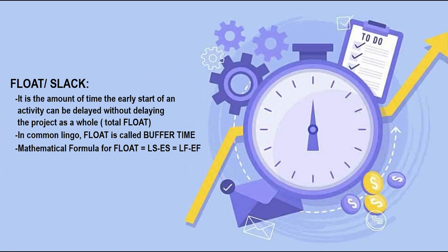When it comes to an activity, there is something known as an early start and a late start. The early start of an activity is the earliest time you can start the activity, and the late start of an activity is the latest time you can start it. As for the definition of float, it refers to the period of time that the early start of an activity may be delayed without having an impact on the overall project. In project management, float is commonly referred to as buffer time.